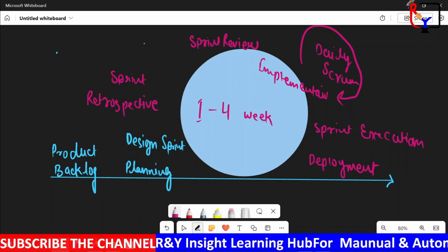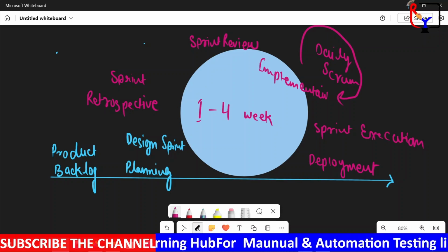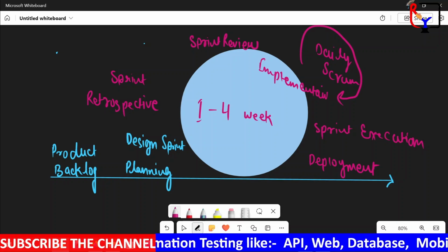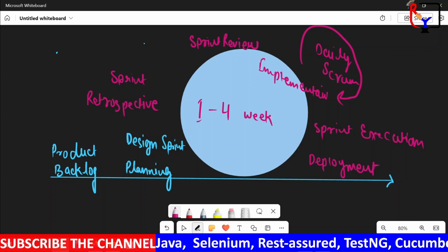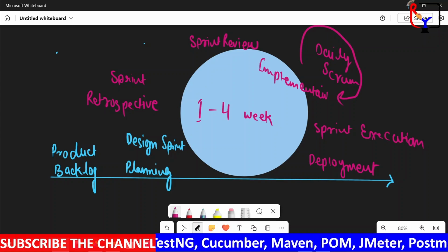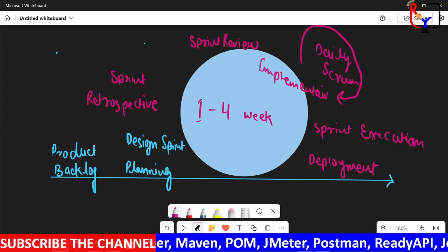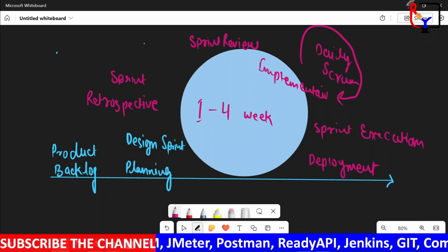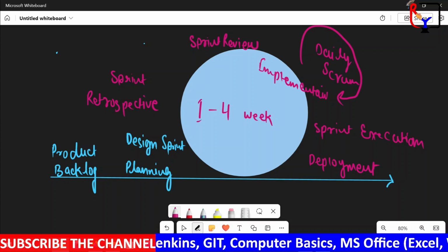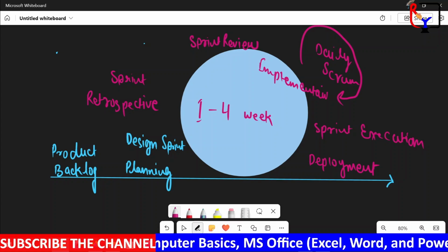Additionally, the incremental stages decrease the time to market, enhance communication, reduce time spent resolving errors, and increase the likelihood of the end user being satisfied with the product. However, this collaboration does require more input and time from the customer during the process. If too many features are requested and added, the team risks pushing back deadlines.